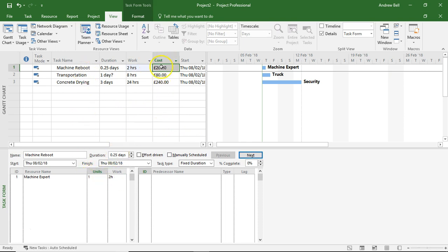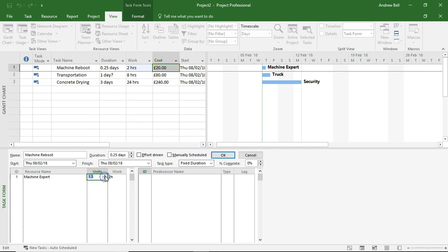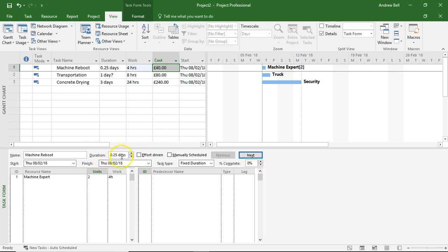If I double the resource on a fixed duration task, I do not do anything with the duration. All I do is increase the work content and therefore the cost.